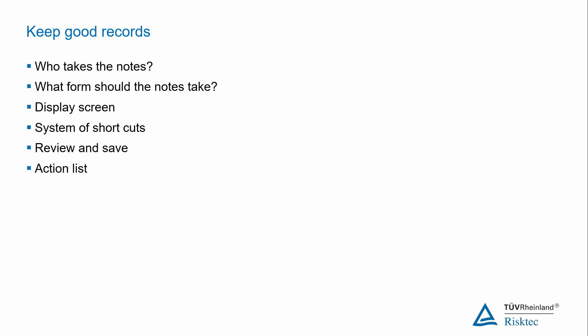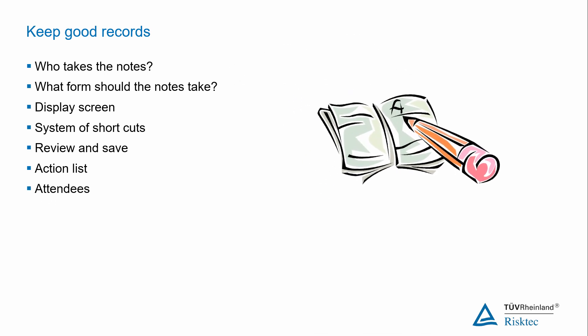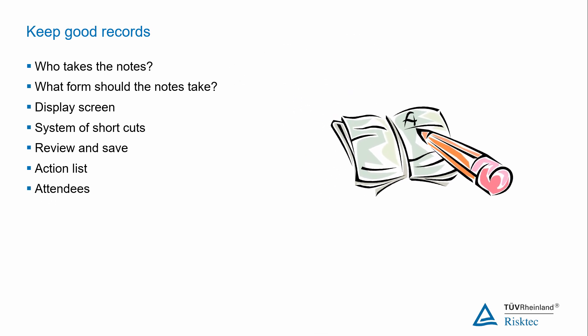In addition to the notes of the actual discussions there are some other key facts that need to be recorded during the workshop. First of all you will need to keep a list of actions, recommendations and items to be discussed and resolved outside of the workshop. Make sure these are understandable, achievable, relevant and have an assigned person responsible for closing them out. Secondly, you need to keep a list of who was there, including people who only participated on a part-time basis. Make sure you record their contact details in case you need to clarify things with them later.